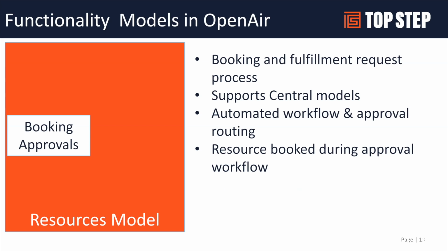Booking approvals came around much later, and really it was an attempt to solve the limitation of the out-of-the-box booking requests. And so booking approvals basically act similar to a timesheet process, but it's for requesting resources. So again, it supports a central model where a project manager or project operations is requesting. Bookings can be approved, they can be rejected. You can request a resource or generic. There's automated workflow and messaging that happens.